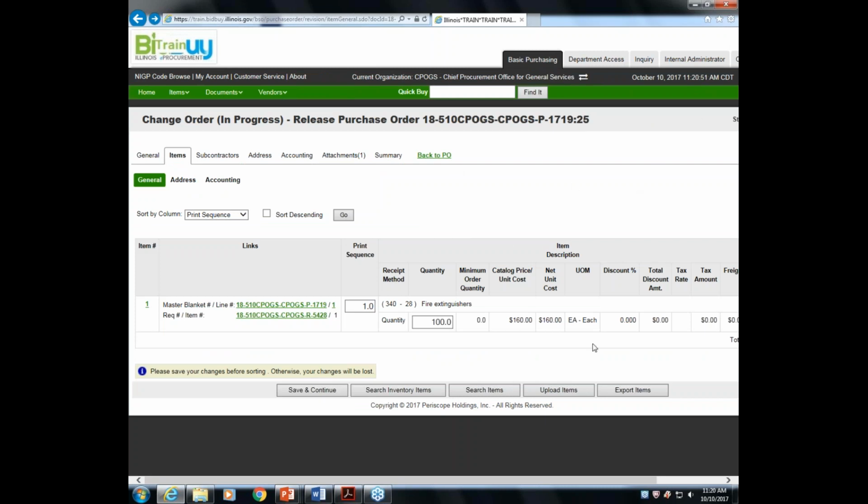On the purchase order, it's very important to remember what your dollar amounts are to determine what signature you need. If there are any questions on, well, what if it's under 20 or over 20 or over 250,000, for example, and you're not sure what do I need? Please reach out to your agency staff, just as you would today when you're unsure about what is needed for a particular type of release off master contract or any other type of procurement activity that you're doing.